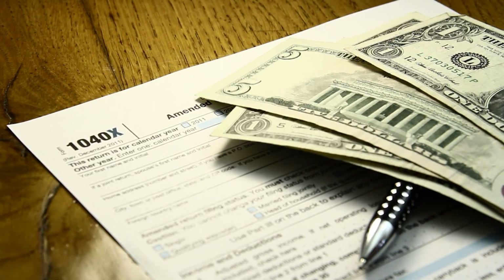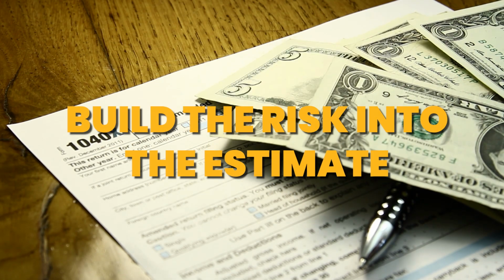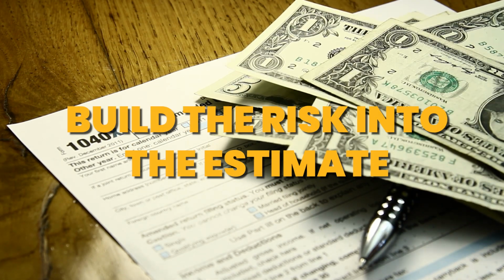Well, that's a really good question. And let me tell you, here's how I handled it. Keep in mind, what you just described there was risk, right? You come to an agreement assuming that this is going to be true, right? Well, that's risk. So the best way to do that is this. Build that risk into the estimate. That's what we would do. We would build the risk into the estimate most of the time. And there might be a situation or a scenario where something could happen. I'd have to really think about it.